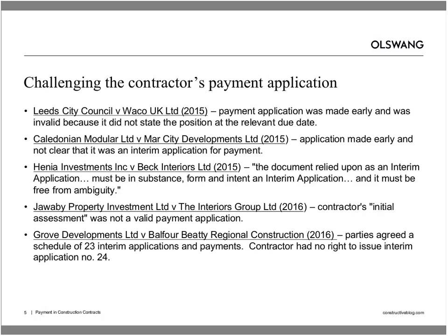I think what's going on here is that the courts recognise that there are very draconian consequences for the employer if it fails to serve a relevant notice, and so they are prepared to look very closely at the contractor's payment applications to ensure that those applications are valid applications being made in accordance with the building contract.